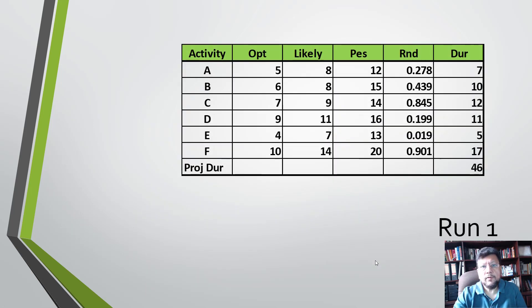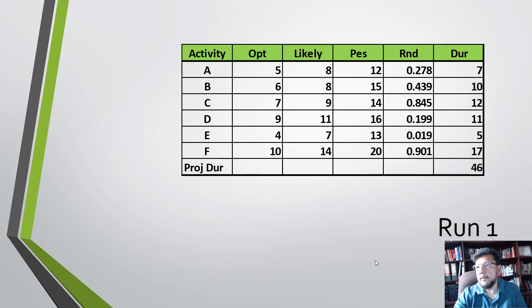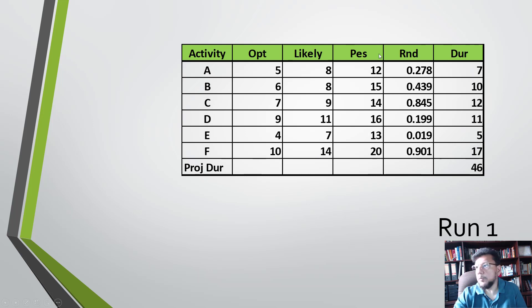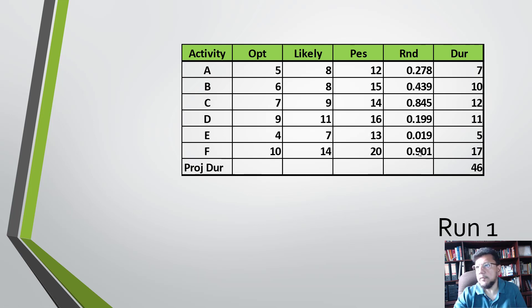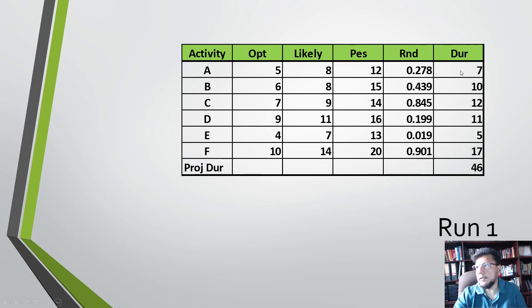Now using a triangular distribution on the same schedule that we looked at earlier. We have three range estimates: the optimistic, likely, and pessimistic. We pick a random number and use the random number to then select the duration from the triangular distribution.